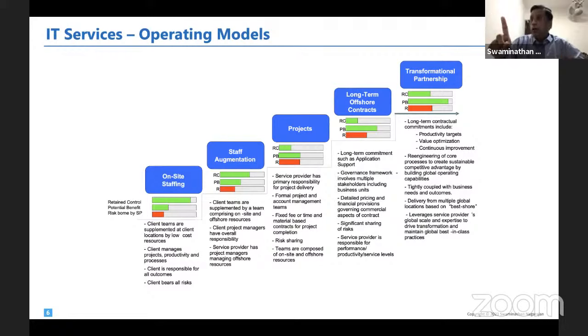Right? Now, he doesn't care how many people you put in, or whether you work day and night or work Saturdays. It doesn't matter to him. You are committed to delivering within a certain calendar time frame at a certain cost, and the system should work exactly as he said. If you don't, today's contracts ask for a penalty. When I say penalty, the penalty is huge. For every 1 day of delay, the customer might say, please give me back about 10,000, because based on whatever the service provider has committed, the customer has gone and made his plans further, right?